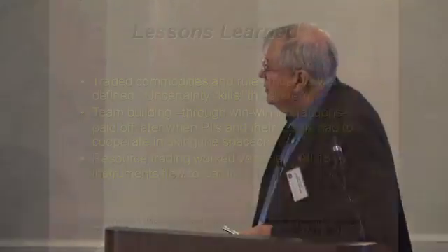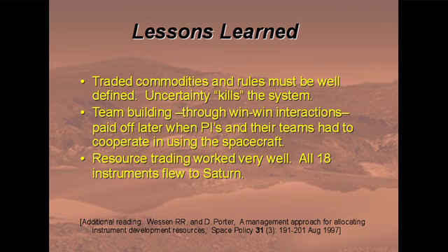You can imagine that the payload manager had gotten the job of going around the instruments and squeezing money out of each one of them. Team building through win-win, I've talked about. Resource trading worked well for us. All 18 instruments flew to Saturn. But you're very critically dependent on it being a well-defined system, with the commodities being exchanged being well defined.